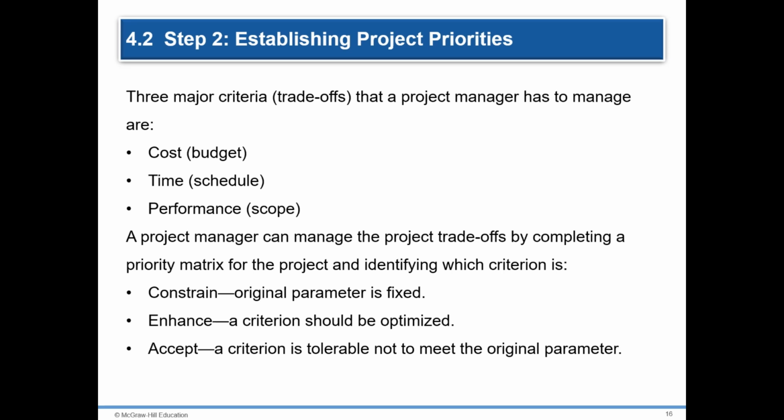However, a positive correlation between cost and schedule may not always be true. At times, the project cost can be reduced by using cheaper, less efficient labor or equipment that extends the duration of the project. Likewise, as will be seen in the next video, project managers are often forced to expedite or crash certain key activities by adding additional labor, thereby raising the original cost of the project.